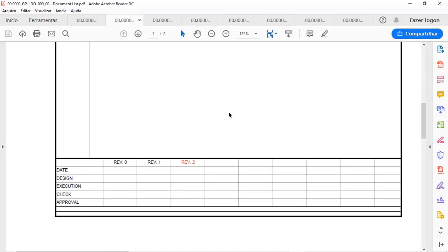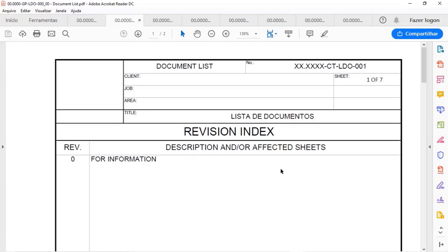And in the bottom of the document there is a very important table that is related to revision, and every engineering deliverable must have a revision control, because you need to be aware of what document you are working with, but most important, what revision you are working with also, because when you are in a project, revisions may change very fast, and without that control you may lead to misunderstanding. This is a cover template for most documents that I develop in Microsoft Word.